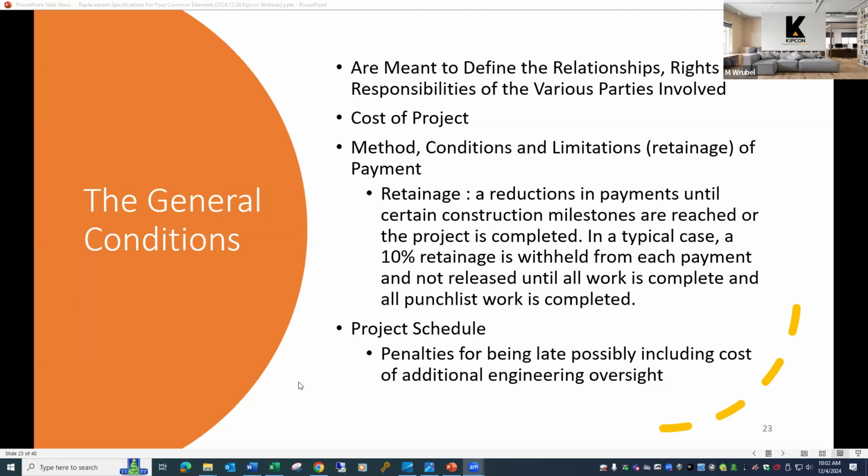There were, I think, about 100 balconies in this community. So payment was based on the percentage of balconies done. Once a third of the balconies were done, everything was inspected and payment was released for that third. There are different ways to structure the payment to the contractor, and it is dependent on the project.